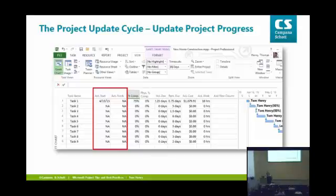So once you've specified a percent complete, you must come in and say the date that it actually started. If you don't, Microsoft Project will assume the planned start date. So basically, eventually every task is going to be marked complete, and unless we've specified the actual start date for some of these tasks, what's going to happen? They're all going to start and finish on plan, as per what we originally planned, because we never updated it really. Okay, so very important. Please remember that.